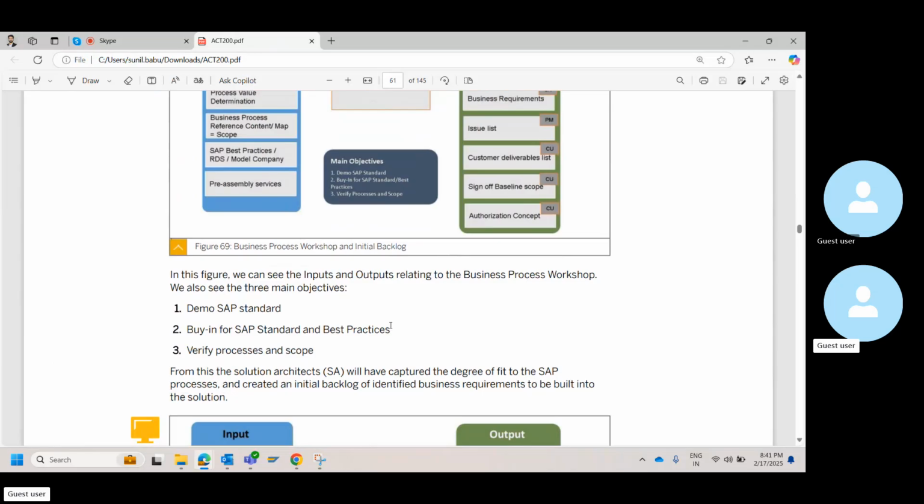You're trying to build a system, showcase the system, show what is standard, and try to get the feedback. This is show and tell, basically what Agile preaches. Then you are trying to do it incrementally. You are taking the concept of a backlog, which Agile preaches. Then you are prioritizing, which is what Agile preaches. Then you are doing multiple rounds of workshops with them during the realize phase, which is what Agile preaches. Then you take incremental approaches of releasing your product, releasing your backlog. That's again the Agile method.